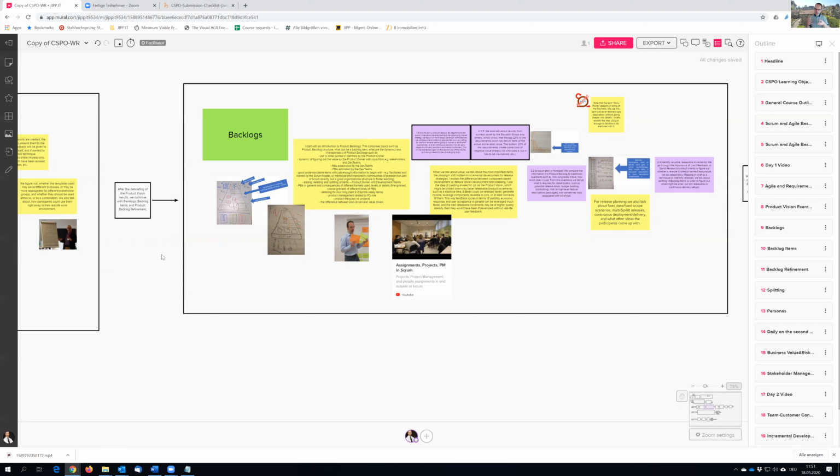We talk about the vision, how it connects to the product backlog, what it has to do with the product backlog items. Also, that the product vision is some kind of filtering mechanism for the product owner to figure out whether a requirement, an idea should go into the product backlog or not in the end, or it should be considered for the product. Because filtering in that sense means if it has nothing to do with the product vision, then don't do it. Like going back to the Scrum values, courage to say no sometimes. There's also a video in here you can watch.